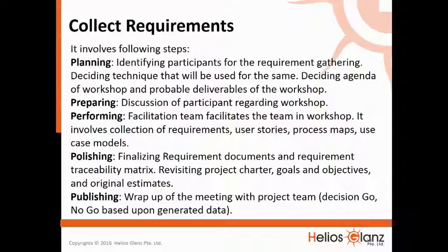Performing. Facilitation team facilitates the team in workshop. It involves collection of requirements, user stories, process maps, use case models. Polishing, finalizing requirement documents and requirement traceability metrics, revisiting project charter, goals and objectives, and original estimates.